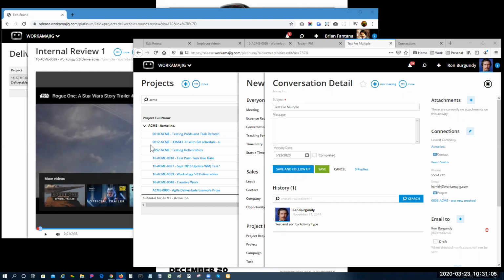Julia asks, if clients want to put projects on hold or push them three weeks out, is there a simple way to do that? That's not necessarily a part of the conversation today. But if a client wants to put a project on hold, I would just say use the On Hold project status. That way it's not active. It stops the schedule from moving, and it falls off everyone's screen. So it's not active anymore by default anyway. That's how I would manage that.